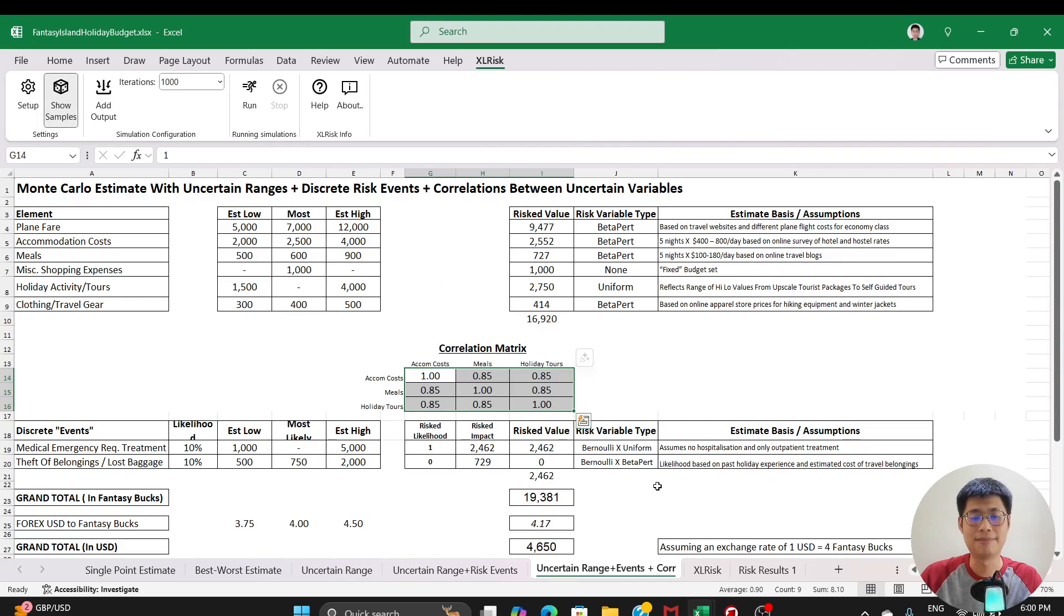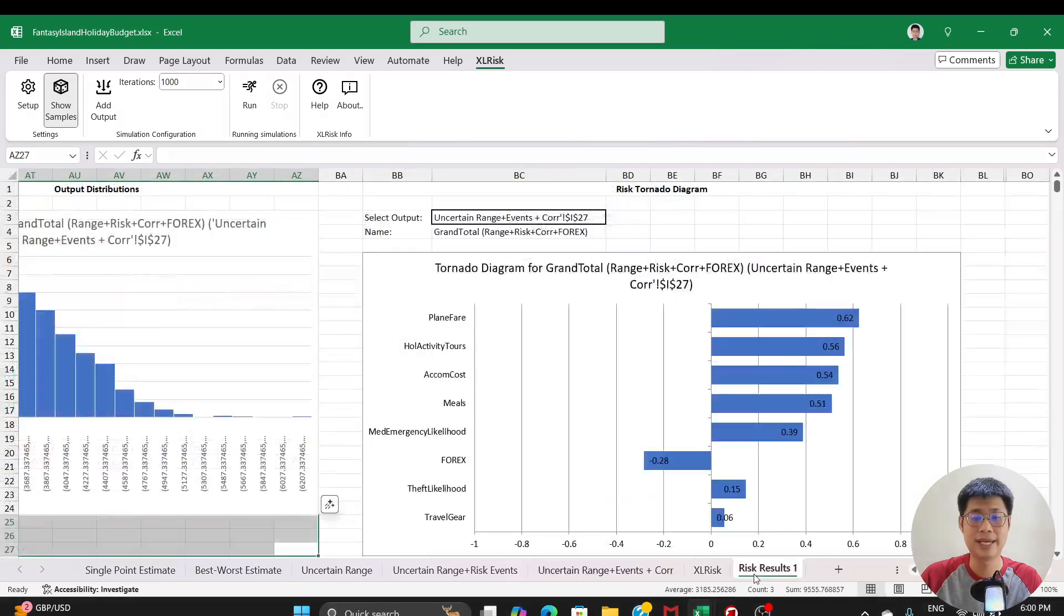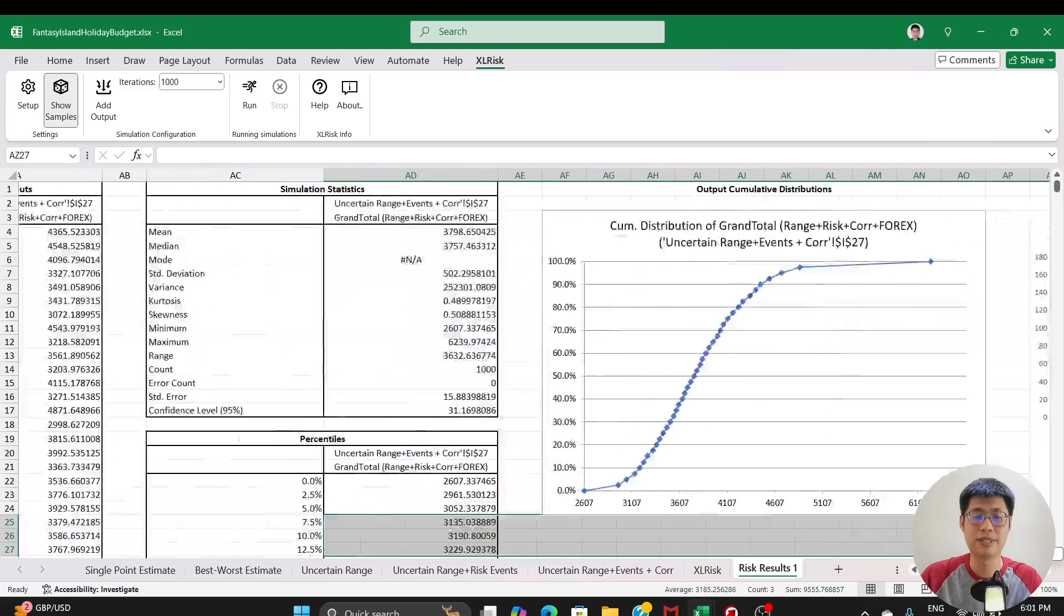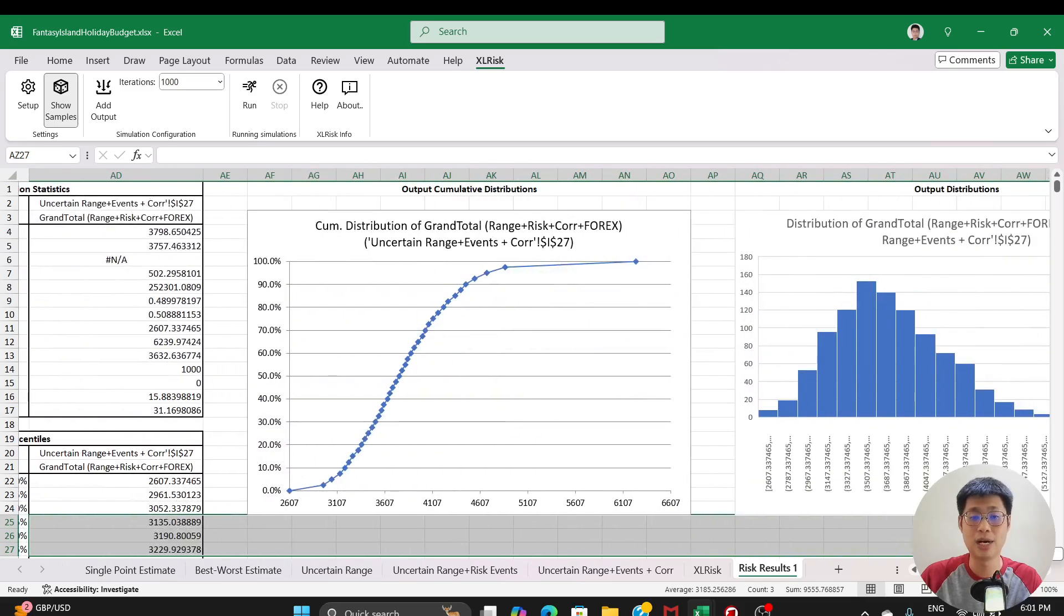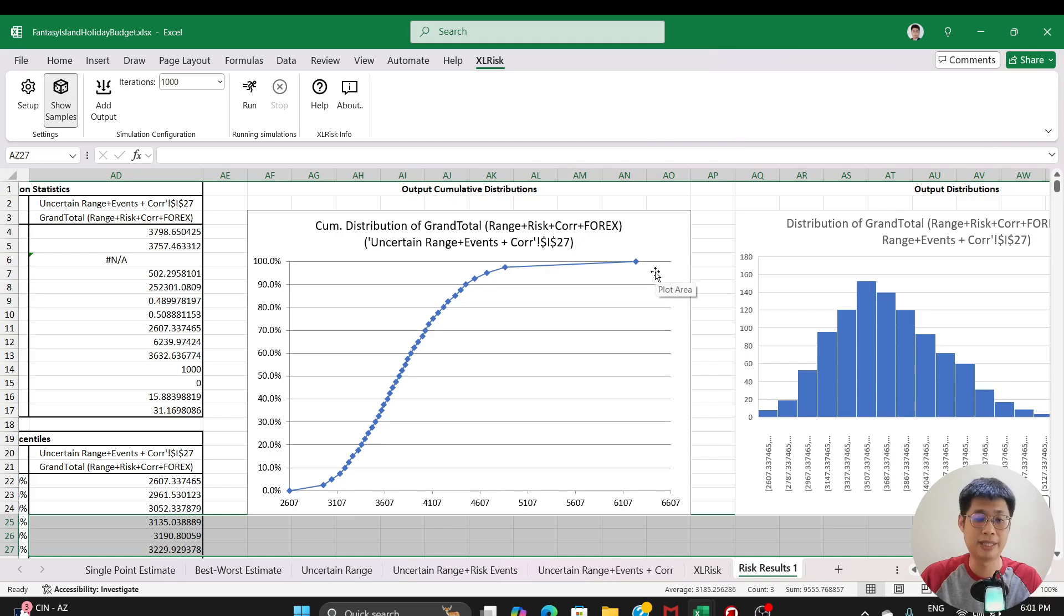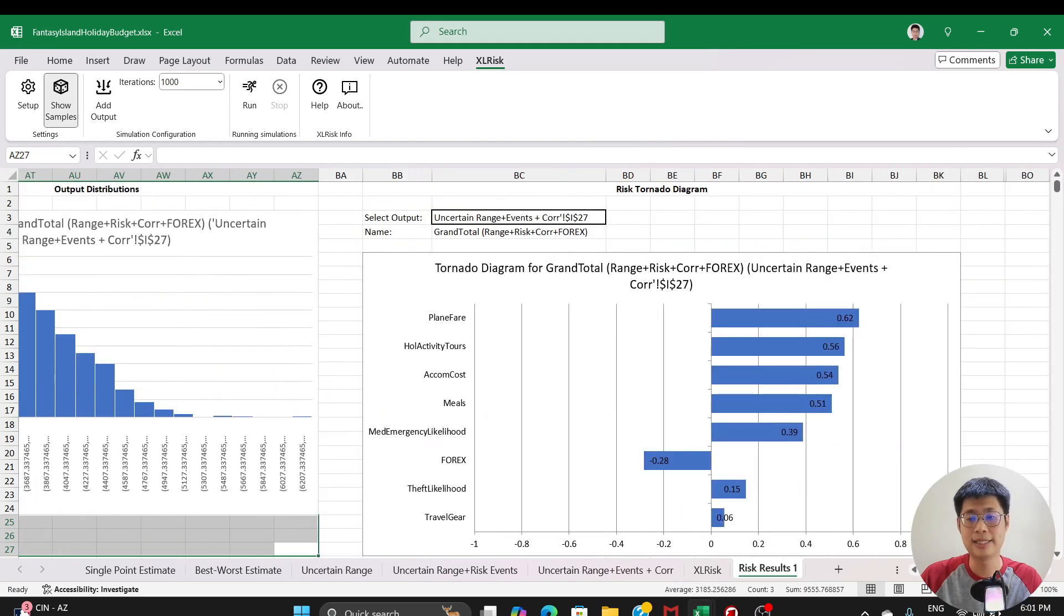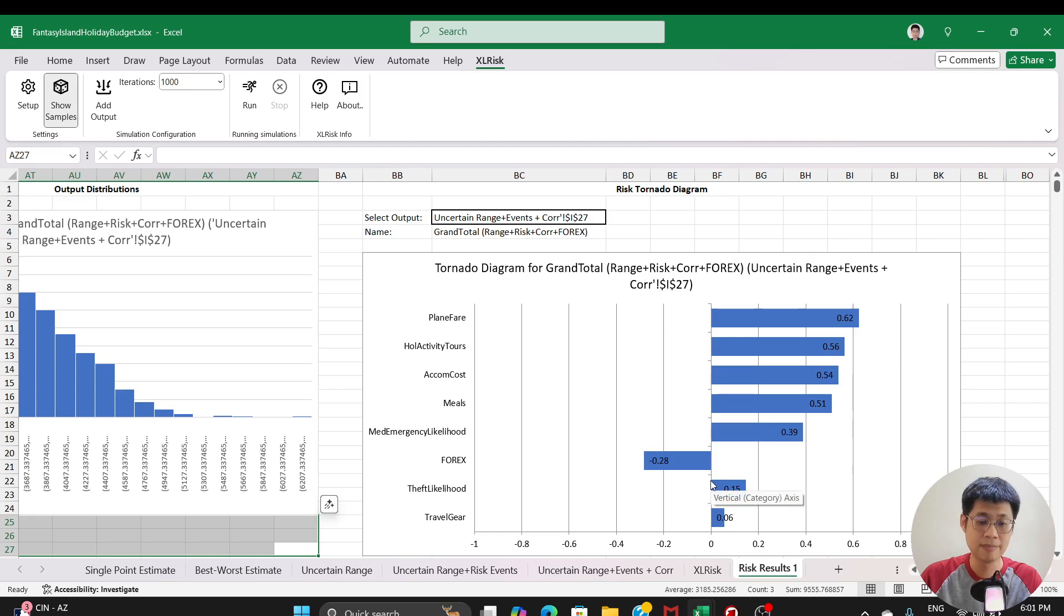So the principle is you run the simulation to the end and then you get maybe 10,000 or whatever number of simulations that you want. And you can plot all the different outcomes and you can see the range of possible results. And you can also understand what are the inputs that drive those results.